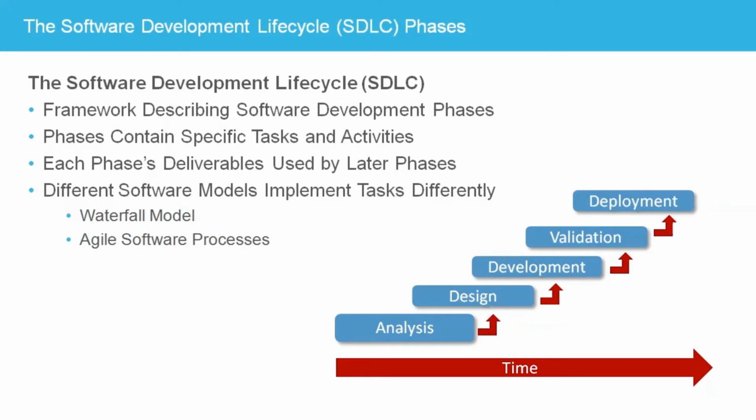The analysis phase includes in-depth research and analysis on the system concept and user needs. This knowledge is used to transform the high-level statement of work to a detailed architectural and functional requirements document, stating exactly what must be accomplished.